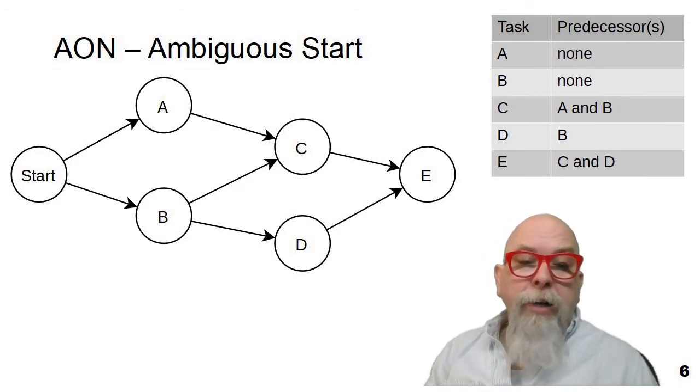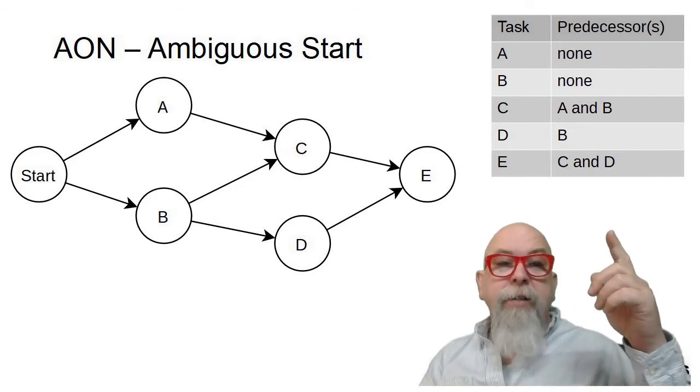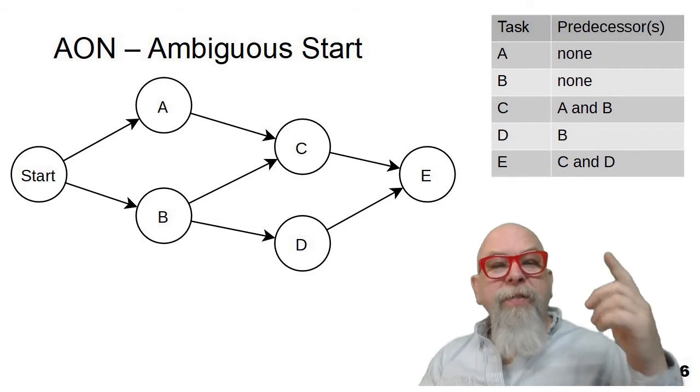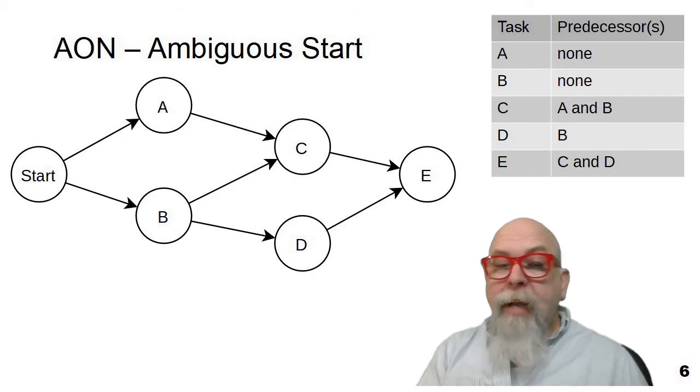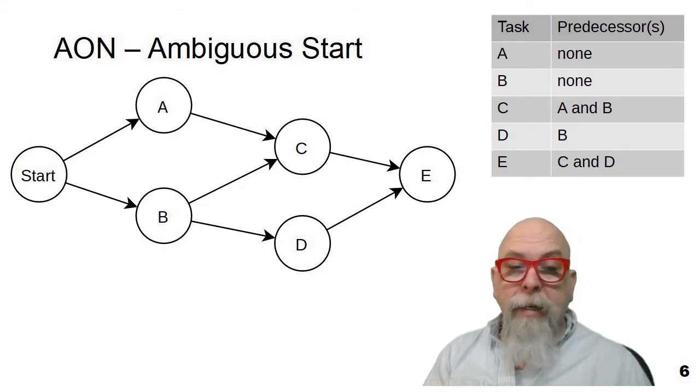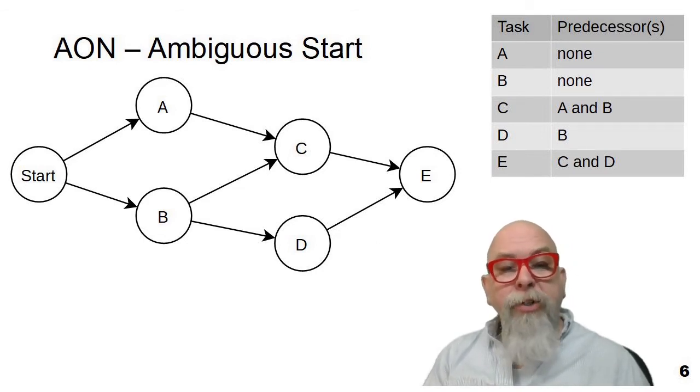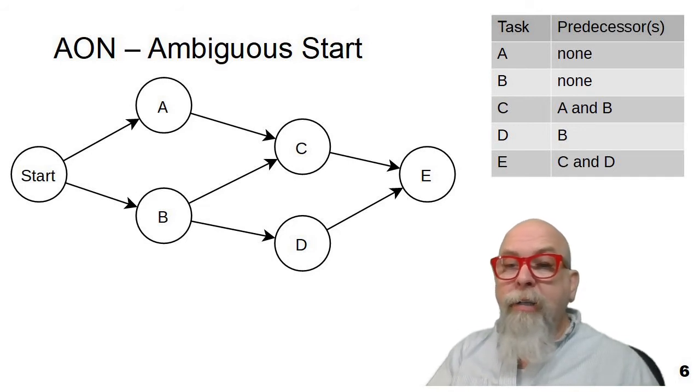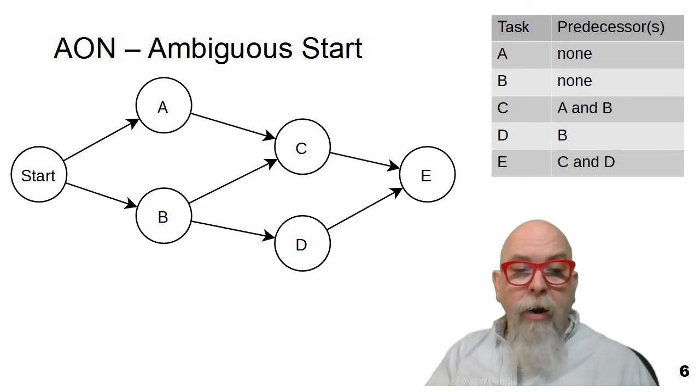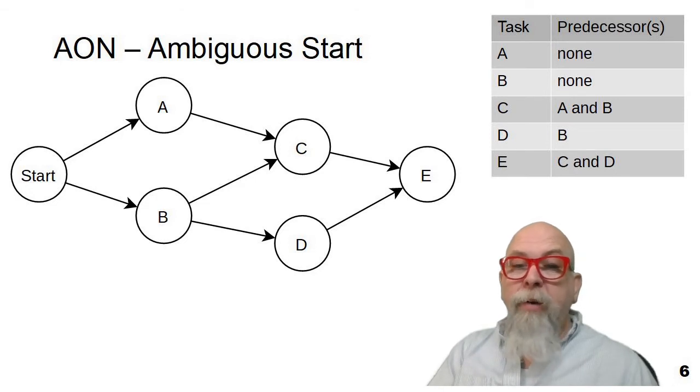So let's look at a second project, a second network of tasks with their predecessors. But notice that this one is a little different, because tasks A and B neither have prerequisites. So task A could be started at the beginning, task B could be started at the beginning, or they could be started simultaneously. Because of that ambiguous start, there's no clear start, I put a special node over on the far end called start. And you can see that start is kind of a dummy node, but it's a node that says start here, and we can then go once we start to A or B or both at the same time, and they don't have prerequisites.